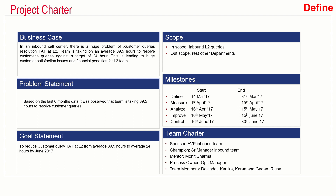The business case should be defined by answering this question: what will happen if the project is not done? If this project is not done, the huge turnaround time at the L2 team level will increase customer dissatisfaction and there would be huge loss for the business. The problem statement: based on the last six months of data, it was observed that the team is taking 39.5 hours to resolve customer queries.